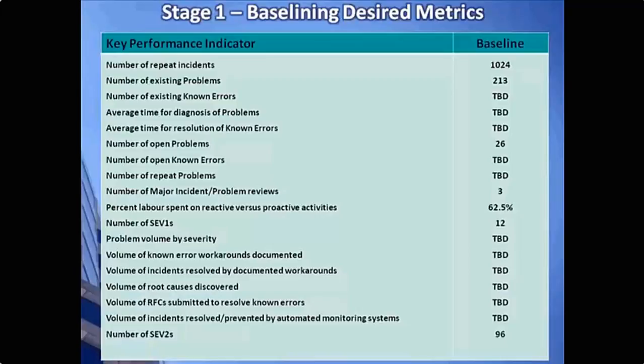Produce these reports on maybe a monthly basis, even as you're implementing the process. So even though the process is not in place, still produce these reports so you can show how things are progressing over time. And again, the value of this is when those questions come up from management about where the project's at or what's going on, you have these at your fingertips and you don't have to distract your team to try to scramble to produce this stuff on a last-minute basis.